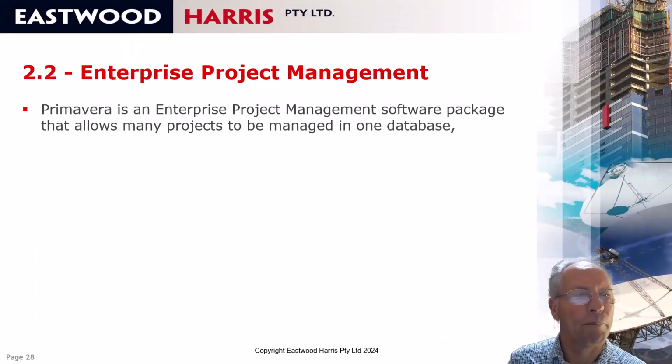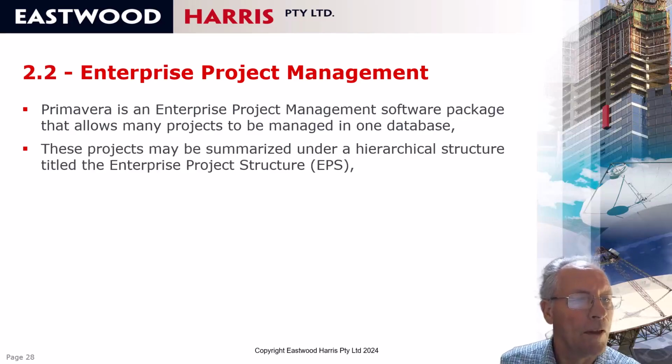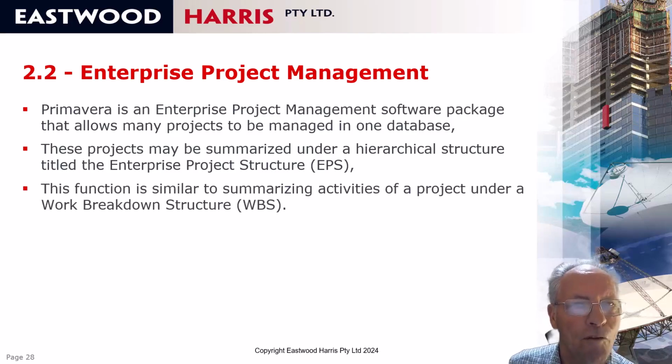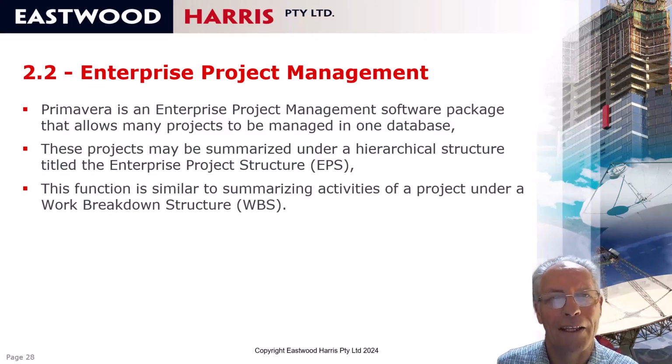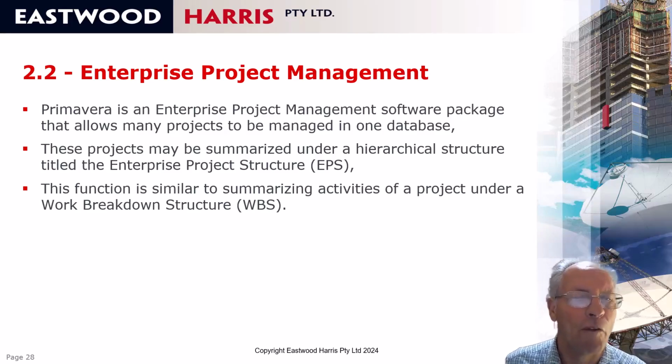Enterprise Project Management. Primavera P6 is an enterprise project management software package and thus allows a large number of projects to be maintained in one database. These projects may be summarized on a hierarchical structure titled the Enterprise Project Structure, and this is very similar to creating subdirectories to create and manage your project data under. And this function is similar to adding activities in a project in the activities window, and therefore managing projects under the Enterprise Project Structure is very similar to managing activities under the WBS, and therefore makes it a little bit quicker to learn how to use the software.